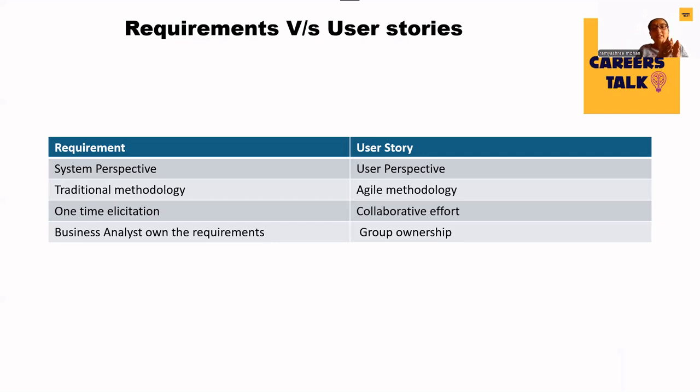So now the developer is developing in the first week. In the first week itself, the tester also should come up with all the possible scenarios that can be tested as part of this user story. So now the developer knows, okay, this perspective is also there. Okay, this condition should also be added. Can you see it is a collaborative effort? And also once it is delivered to the tester in the second week of the sprint,